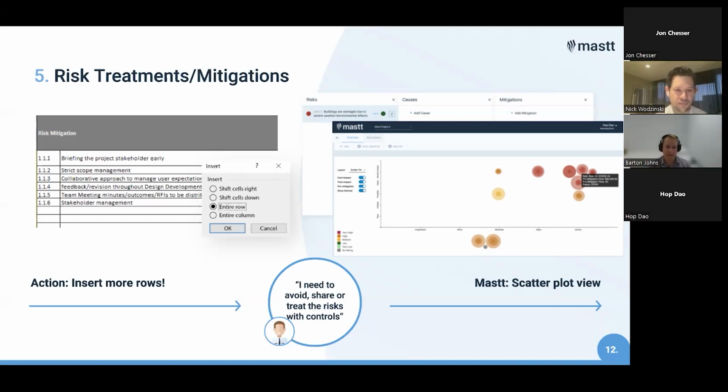And I felt that the stakeholders trusted that we were looking at the risks that are the biggest risks to them. Then we click on that bubble and go into it and review the risk, the causes, the consequences, and the mitigations. That's particularly handy when it's not your first risk workshop on the project, but a subsequent one, say at an iterative design milestone, when you want to review the status of risk, whether it's been mitigated partially or wholly through design. You want to be able to target those high risks.